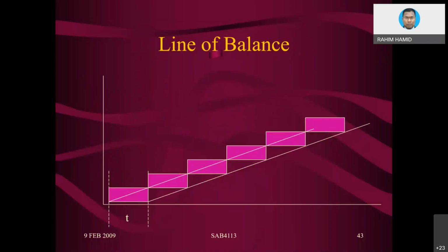So if that is the case, then we can use this line of balance concept to show the relationship between quantity versus time. Let's say for piling, how many piles can we drive in 1 day, for instance. Because the piles look the same and the area is also the same, you can have a linear relationship for piling alone.